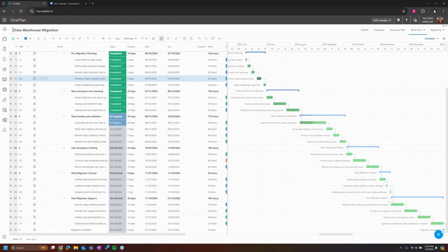So next up, and similar to dependencies, are going to be constraints. All schedules have constraints, and this constraint defines the schedulable range for a task. The date range is created by the constraint date and the constraint type. And the constraint type restricts the event start and end dates to being not earlier than, not later than, or equal to the provided constraint date. So really what this means is that you're providing these hard guardrails for these tasks in your schedule, right?